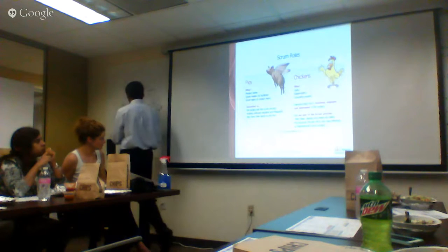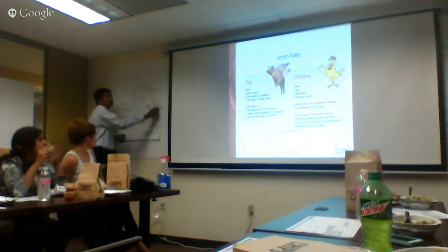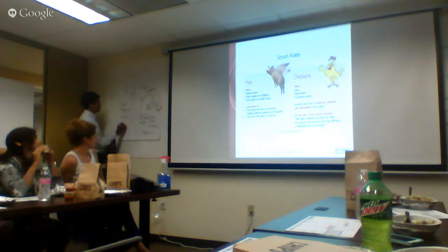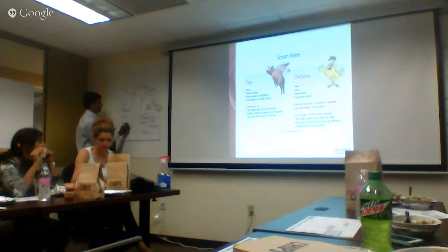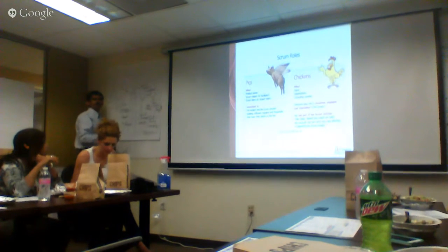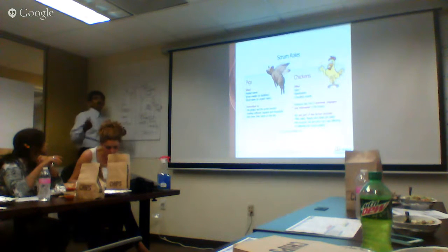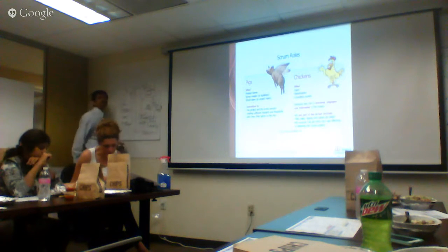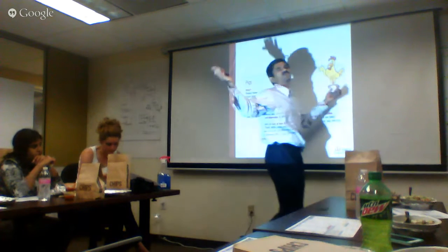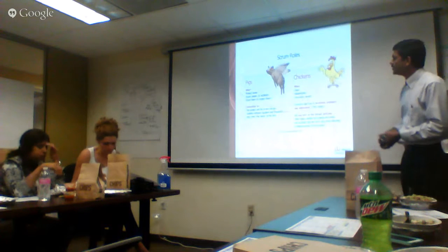Now, I forgot to tell you here. In this process, who facilitates this meeting? Who removes the impediment? Who makes sure the Scrum values are being followed or not? That guy is called Scrum Master. So you have three basic roles in Scrum. Product owner, who owns the product backlog; team, who does the work, self-organizing, so you don't need anybody to manage them. And then Scrum Master, who helps make sure all Scrum values are followed, removes the impediment; he's a servant leader in short.